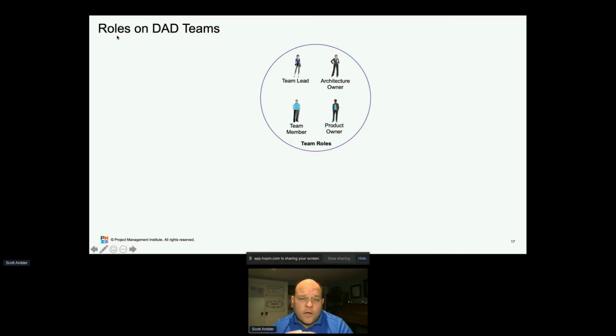In DA, we are not limited to a single framework. We choose to think outside of the Scrum box. For example, yes, you might have Scrum Masters, but you might not, and that's okay. We have an explicit architecture owner. This is our version of an Agile architect. This person leads the technical and architectural decisions, and guides and mentors the team through making these important long-term decisions. Product owner, an idea we adopted from Scrum.